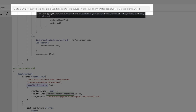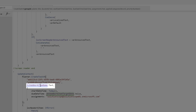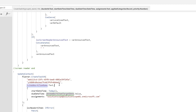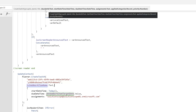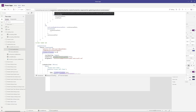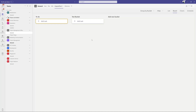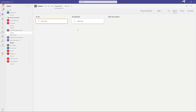You can see here the group ID, the plan ID, and the title of the task. You'll notice that we are going to pass in the name of the work item or the milestone — we're going to take that name and actually pass it into the planner task. That is what 'txtAddWorkItemName.Text' represents. If I place my cursor just after this comma, you can see that we can pass in additional parameters. The first item is the bucket ID. I'm going to go ahead and pass in a value here, and what that's going to do is allow me to create these tasks in a specific bucket of my Microsoft Planner plan. I've switched over to Microsoft Planner and I am going to pass in the unique identifier for this bucket called 'test bucket.' Whenever a new work item is created in the Milestones app, it's going to create that task in this plan and specifically add it to this bucket.